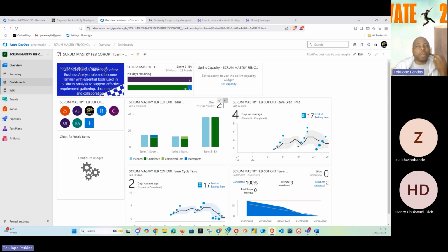And then again, your developers have to be kept relatively constant. So if you have 5 developers for the first sprint, 5 developers for the second sprint, 5 developers for the third sprint, then that will give you a true picture or a near true picture. But you don't get those things absolutely every time. So you just have to make use of a line of best fit. If you have your developers constant, good for you. So you're able to calculate your velocity at the end of the 3 sprints.